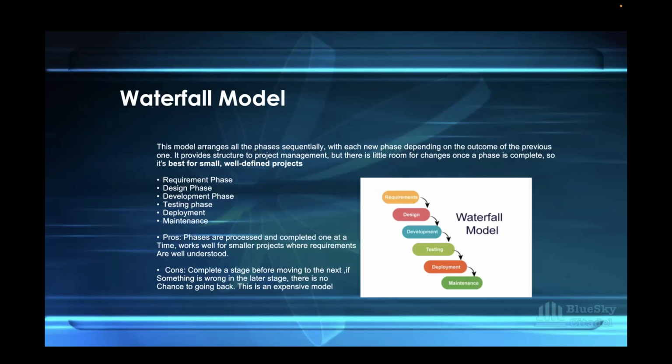So with waterfall, what I'm trying to say here is, for a big project, an extensive project of up to 2 to 5 years, waterfall will not be ideal for such projects. For a smaller project, waterfall will be okay to use, because of the little room for changes. So that is why waterfall will not be advisable for a massive project. And so we have the requirement phase, the design phase, the development phase, the testing phase, the deployment, as well as the maintenance.